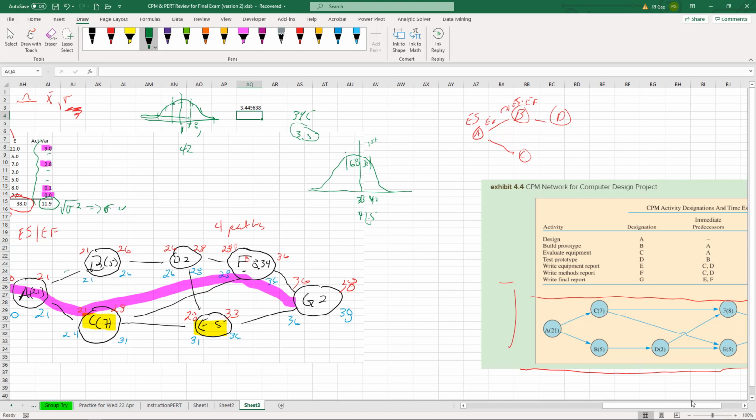So the probability at the mean is 50%. That's all this area down here on the left, right? And what goes up 32%? We're going to add 32. So we're a little bit more than 82% sure. That's why we use the empirical model, because you can slice and dice it roughly. It's a rough cut as to what you're doing. Not that you can read that. Hold on, let me change my font. So 50 plus 32 is 82%.